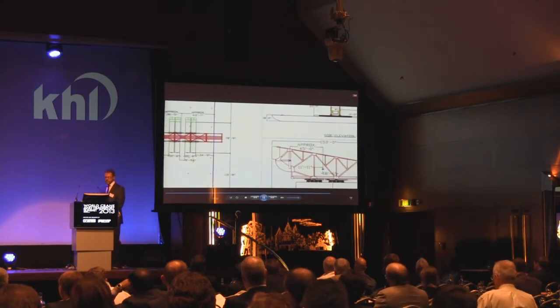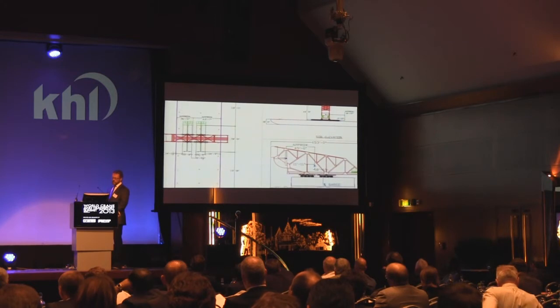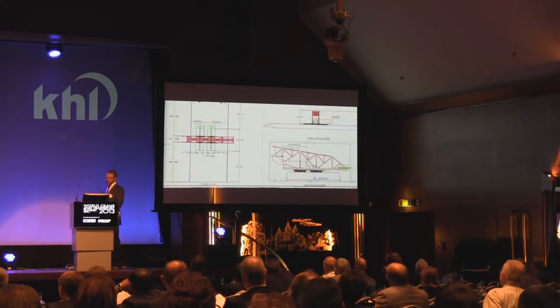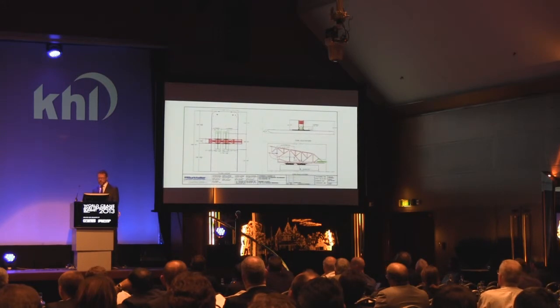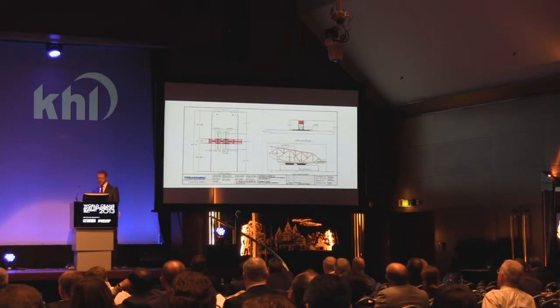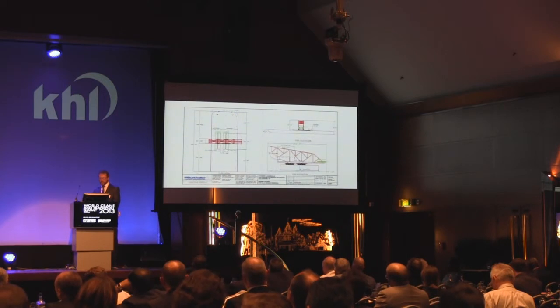The first of which involved basically cutting it into 2 pieces, leaving the counterweights on shore, and we would take the rest of the bridge out on top of our transporters on the barge. This raised some environmental concerns. We don't know what all paint is on it. We don't know what happens to all the metal that gets cut over an existing waterway.